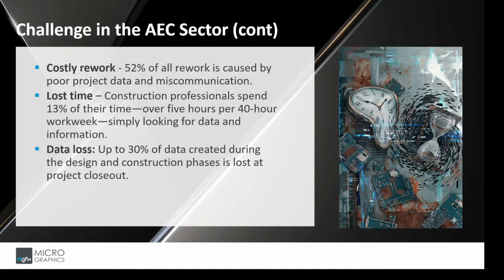Lost time is another thing. Construction professionals also report spending 13% of their time, over 5 hours per 40-hour week, simply looking for data and information. And this is obviously due to filing systems and how information is shared.